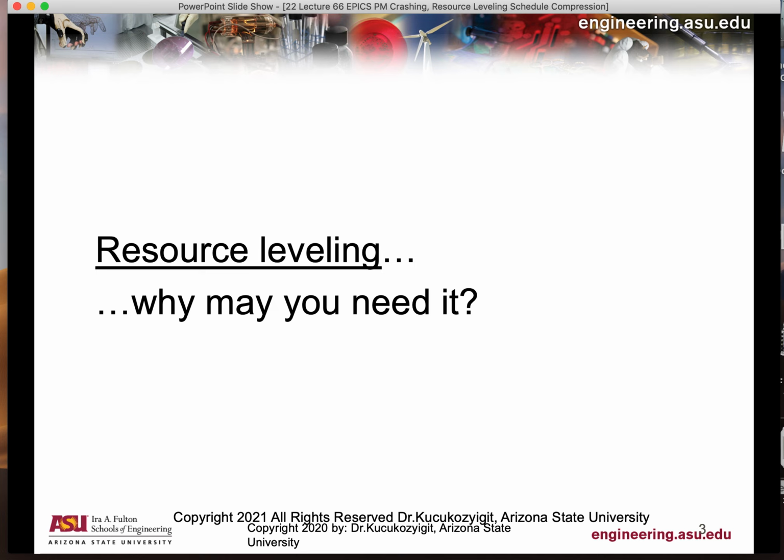So you've got to find out the risks, okay, and how you're using your resources. If there are a lot of peaks and valleys in your resource usage, then you want to level them so you can effectively use your resources. That's basically what resource leveling is. There are different tools that you can use, but you can use something as simple as an Excel spreadsheet.